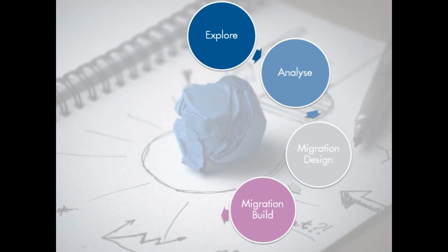Testing the migration solution is usually an iterative approach, of course. Start by checking the components individually in small subsets to ensure the mappings, transformations, and data cleansing routines are working. Then increase the data volumes and eventually link all the components together into a single migration job. Output from this phase results in a fully tested data migration process that is scalable, reliable, and can deliver the migration within the allotted time.